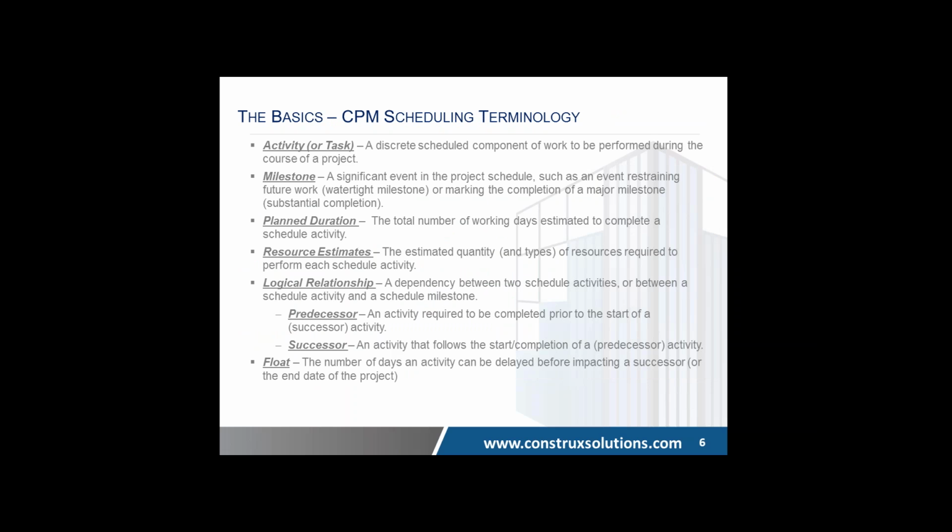The basics of CPM scheduling terminology, this is very, very basic, clearly, but an activity. This is the building block of a schedule. Every schedule needs activities. So every little task in construction for your project, you need to think about, what are all the tasks that are necessary to get this building or construction project from a hole in the ground to an actual structure or asset. There can be any number of activities. There can be long activities. There can be short activities. But everything needs to have a duration and a certain title.